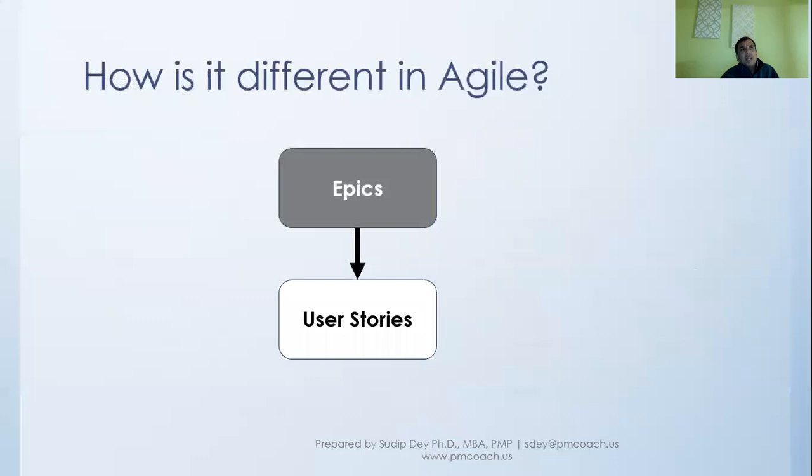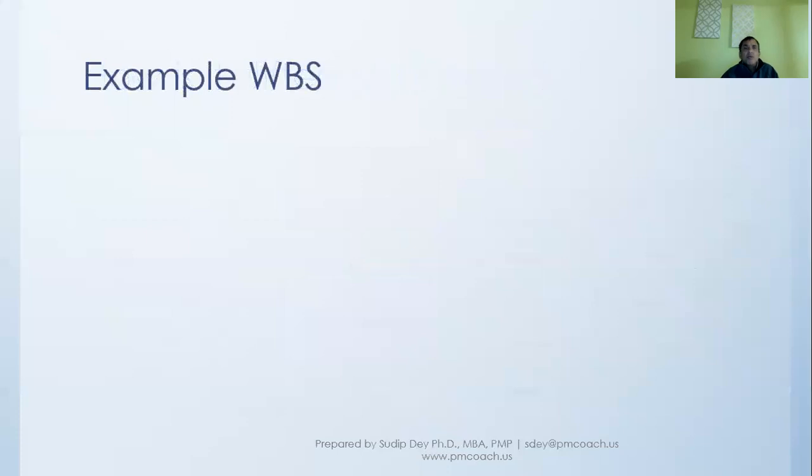Now, there are again different approaches for WBS. For example, you can start top-down, you can start by phases, and you can even do it from the bottom up if you have done too much detailed work in the scope statement. So there are different ways you can go about creating a WBS.